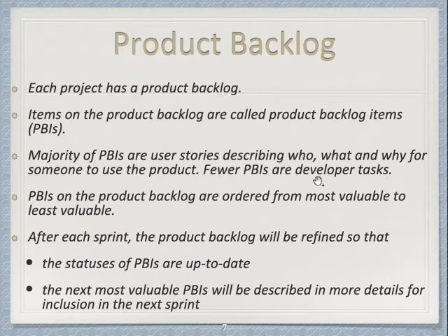What are developer tasks? Developer tasks are, let's say, creating a database or setting up the server. Those are developers' tasks. But the PBIs generally are not that type of task. The PBIs are written from the user's perspective. It is something that the user wants to use the system for. It's not the task that the developers want to do. So the items in the product backlog are written from the user's perspective, not from the programmer's perspective.